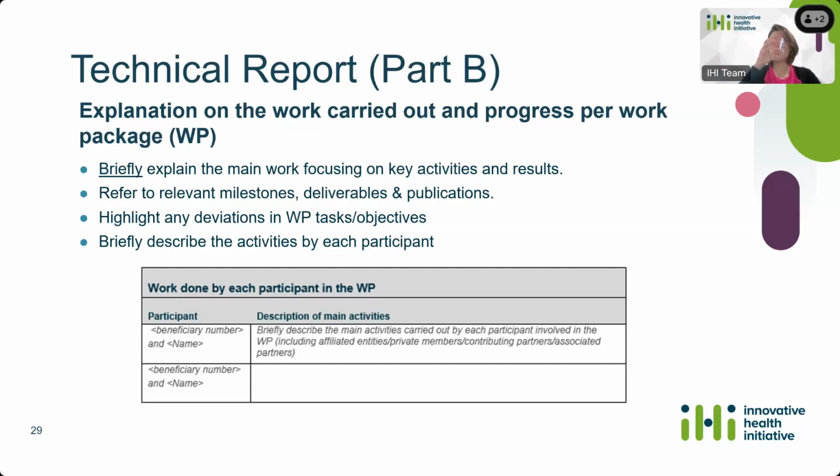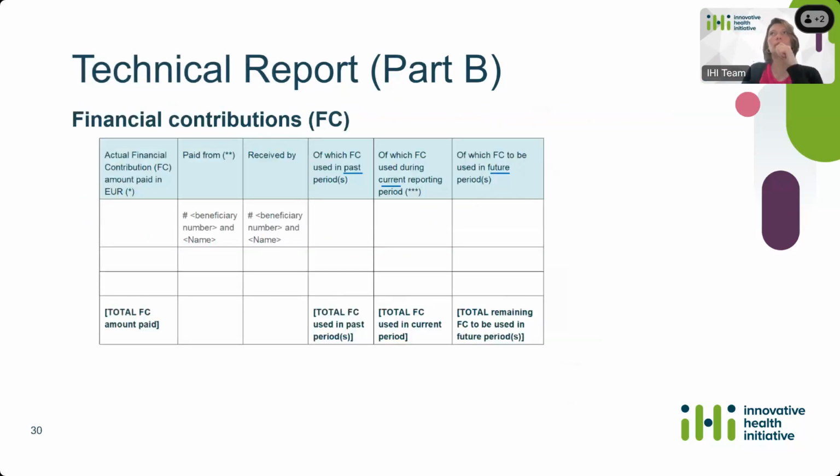If, for example, as a participant, you report personnel cost and effort under work package 1, we expect to see a description of your activities under this section of the report aligned with the reported costs. Next slide, please. So, Gael, this is back for you. Yeah.